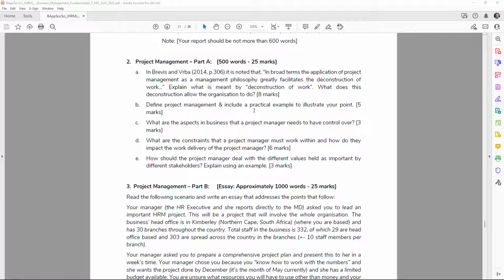You appoint a project manager that doesn't really have line management authority over the people assigned to that project. Yes, those people will have some reporting line to the project manager, but they are allocated from various departments to work on this project, and they still have their original line manager. And this is again another simplified example. So one of the things a project manager needs to be able to do is to manage without necessarily having direct line manager responsibility.